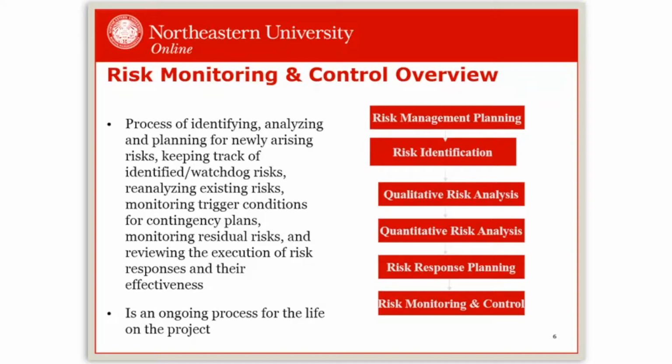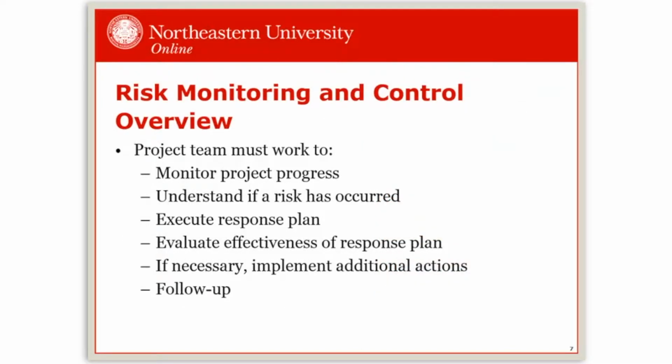Many times I'll see project teams add a hammock activity into their work breakdown structure for risk monitoring and controlling. Once we've put the risk response plan in place, it's an activity that would span the rest of the project so that we know that we are spending time to keep our risk work up to date. Key work during monitoring and control is to take a look at our existing risks and determine if the risk response plan created is still the most effective and what might be more effective, to continue to look for new risks, and also to make sure that risks are being managed according to plan.